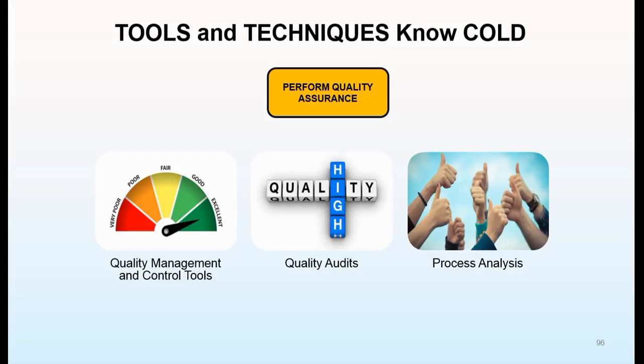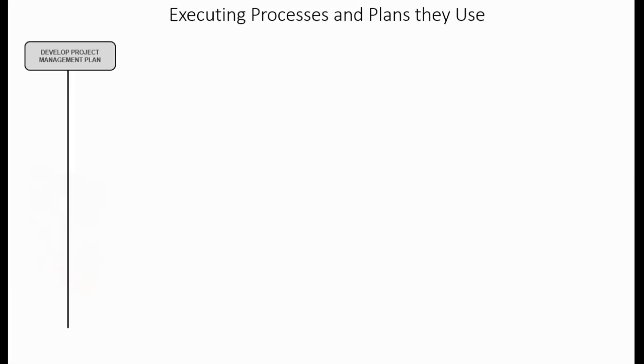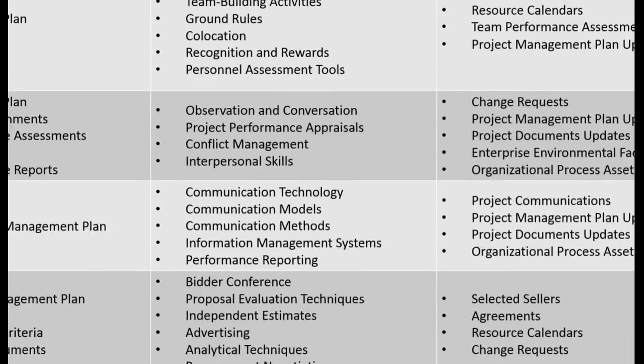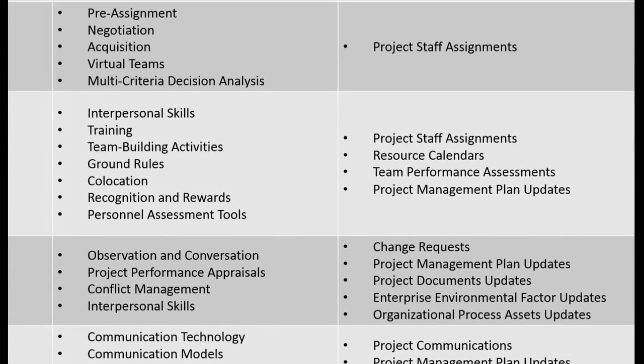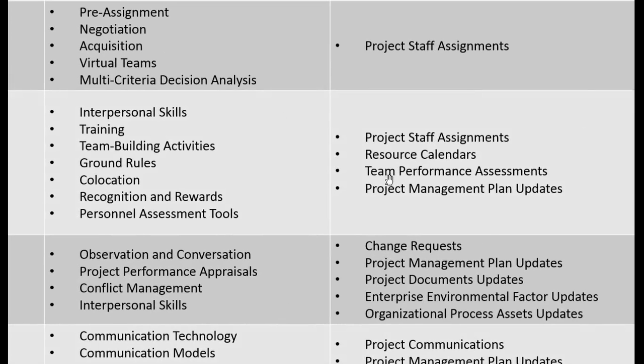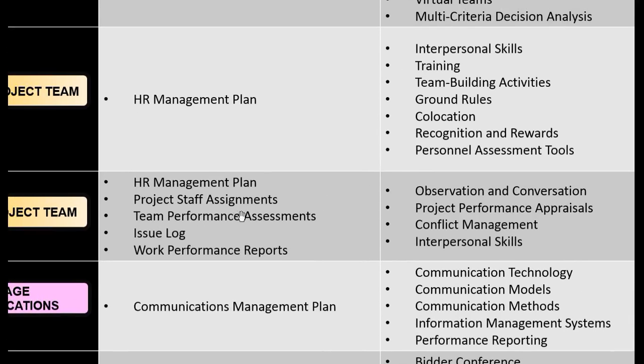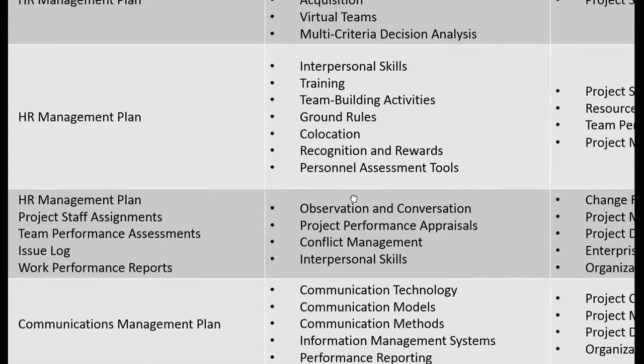I'm going to back up a few slides and show you this just to remind you that a lot of this stuff is input, then output becomes an input again, and stuff like that. So take a close look at this image here. You can see team performance assessments right over here on the right hand side of the screen. Now you also see team performance assessments as an input. But what people make a mistake with is thinking that project performance appraisals are team performance assessments, and they're not. You use your team performance assessments as part of your management approach, part of what you need to manage the team and have these project performance appraisals, and also giving people feedback of what you think they need to do.